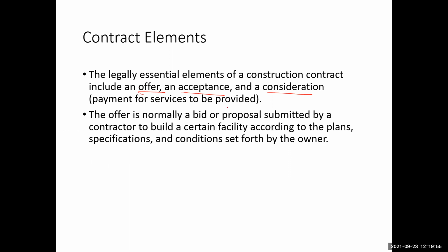So the offer, what is an offer? Offer is normally a bid or proposal submitted by a contractor to build a certain facility according to the plans, specifications, and conditions set forth by the owner. First of all, in a very traditional manner, we are not talking about the design-build or the construction management type of contract. We are talking about a traditional design-bid-build type of project.